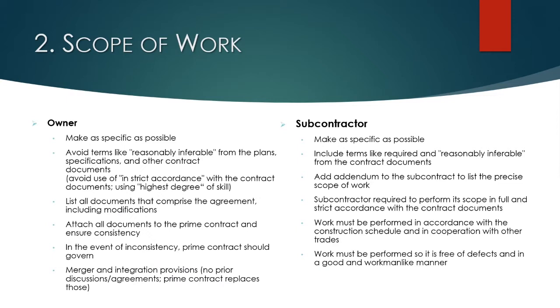Conversely, if you can include them in your subcontract, that would be preferable, because it puts the burden on the subcontractor to go above and beyond just what they see on the plans and specifications. You also want to, when it comes to the subcontract component, make sure that we have language in it that requires the sub to perform its scope of work in full and strict accordance with the contract documents, as well as in connection and in compliance with the applicable construction schedule, and in cooperation with all the other trades that are out there.